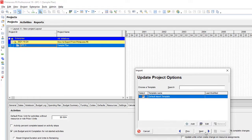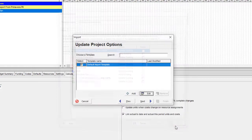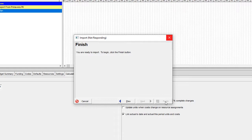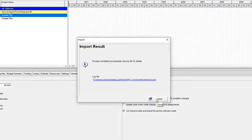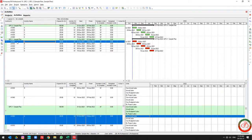Without matching, I am going to use the default template. If you want to change something you have two options over here. Then finish and wait for the result. In this case you are going to import two projects: the current project and the baseline of the current project, so it takes a little bit of time. Now my process has successfully completed. I close this and open the current project, go to the activity sheet, and as you see I have two projects.